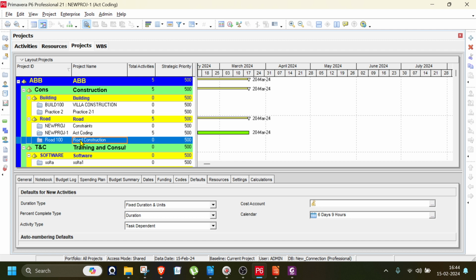We call that a reflection. They create a reflection, we can work on that reflection, then higher authorities will see it and approve. They will check everything, and if it's okay, we can merge the reflection with the original source file. In big companies, if there are 5 or 10 departments, normally they create a reflection and share it on the web. Those reflections they will update, and the reviewing team will review and approve.